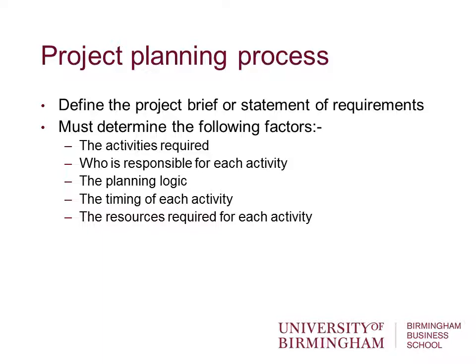Can certain activities run in parallel? Then also you might want to start thinking about what sort of resources are going to be required. And unless we have this information together, we will have no idea of the time the project's going to take, how much it's going to cost, and indeed what sort of outcomes we can expect to be delivered by the project.